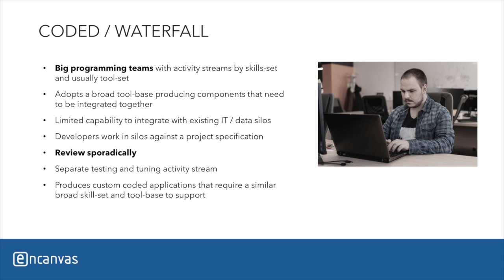Developers would work in silos against a project specification, reviewing progress sporadically. This type of approach disconnected the project development from the stakeholders that required the solution. It led to a lot of recoding and retesting and retuning that produced many of the costs attributed to poor performing projects. Additionally, it required an awful lot of technical skill and many different tools. And this led to a very complex project with lots of project management.